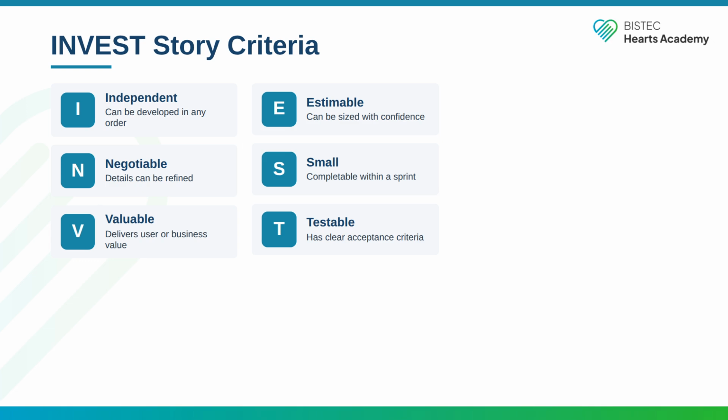Negotiable means the details can be discussed and refined during implementation. A story is a conversation starter, not a rigid contract. Valuable means the story delivers something the user or business cares about. Pure technical tasks should be attached to valuable stories, not standalone.